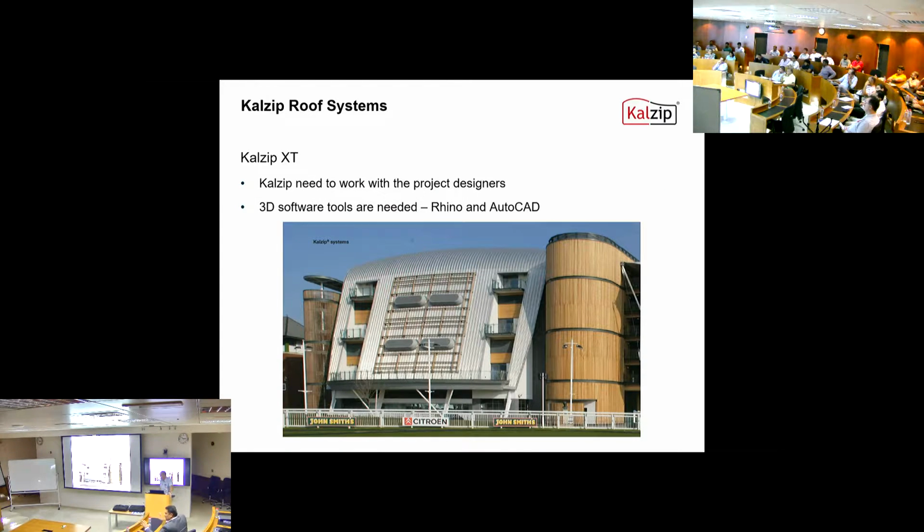Usually, we train our installers and we insist on specific approved installers. Once they are approved installers, we design the drawings and make sure from time to time to do site visits, and at the end of the project, we again inspect it, and what we see needs to be done on the site should be done by the installer before we issue our warranty. Your training, how much is the budget for the trainer?